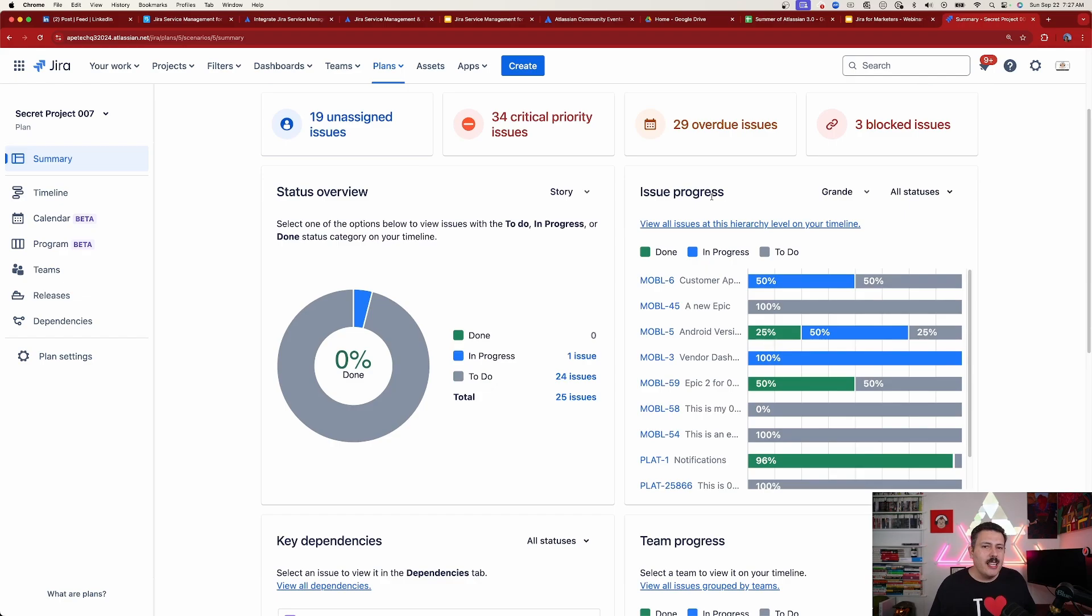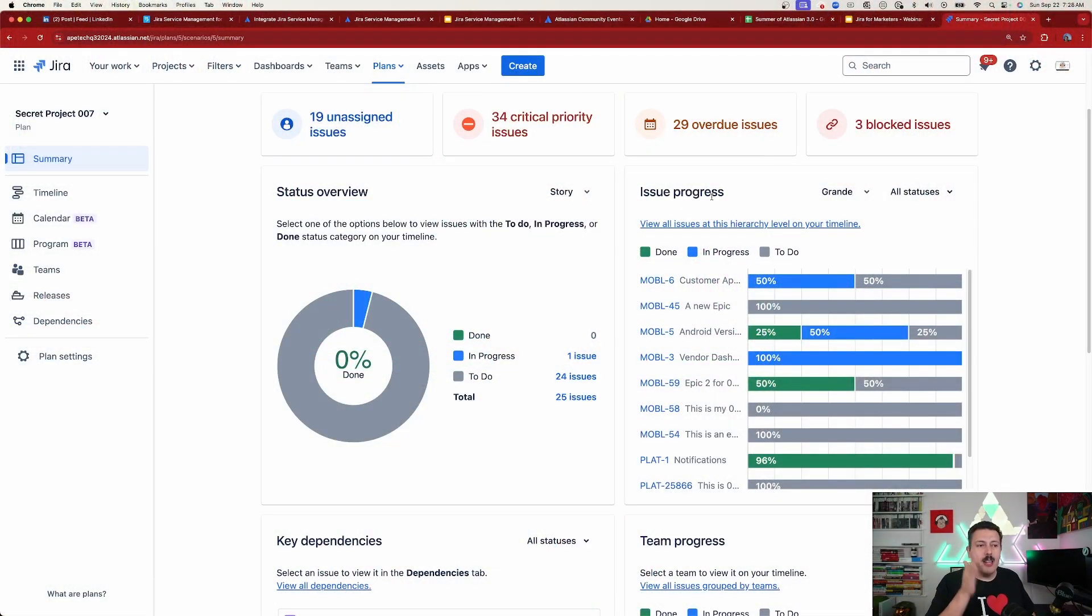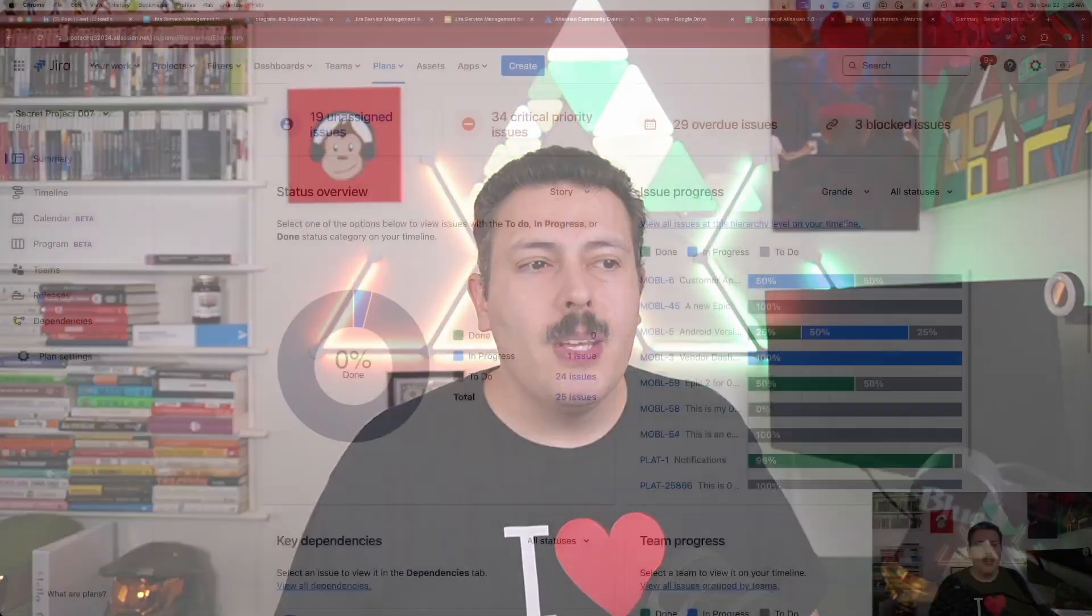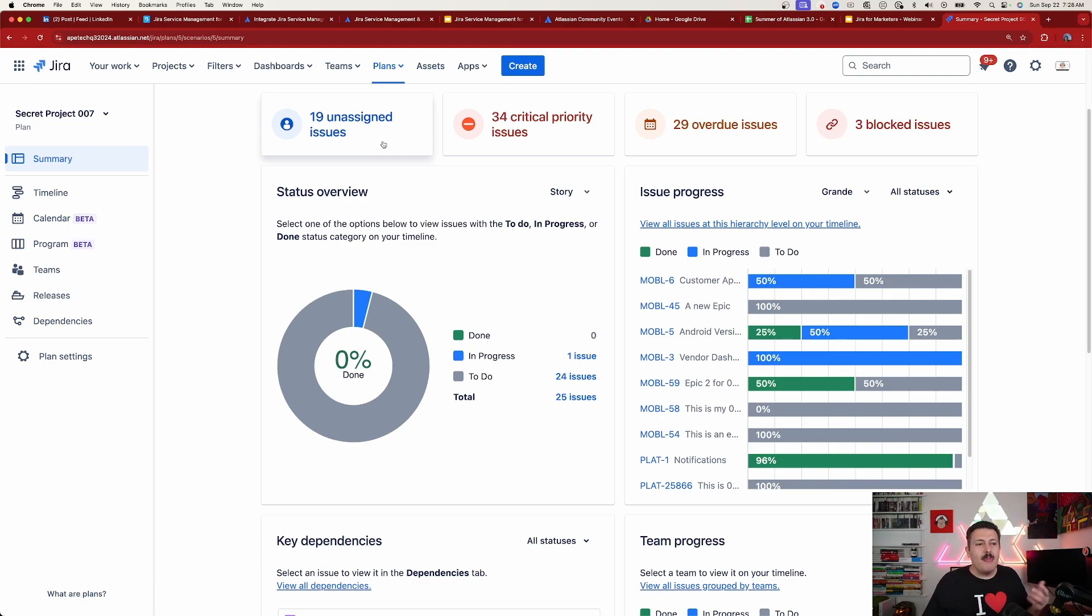So the first thing that you get to see is going to be a list of these four items. Now, you don't get to change these items. These are just created by Atlassian for you. And Atlassian has deemed that these are the most important things. So my recommendation would be work around this, knowing that Jira cares about unassigned issues, critical priority, overdue, and blocked. You can now work with that. Make sure you're using that due date, your blocks and blocks by relationship, your priority field. And most importantly, make sure you're assigning or not assigning tickets based on importance. So essentially, that information that I just described, that gets surfaced. Nothing you got to do. It's all happening behind the scenes.